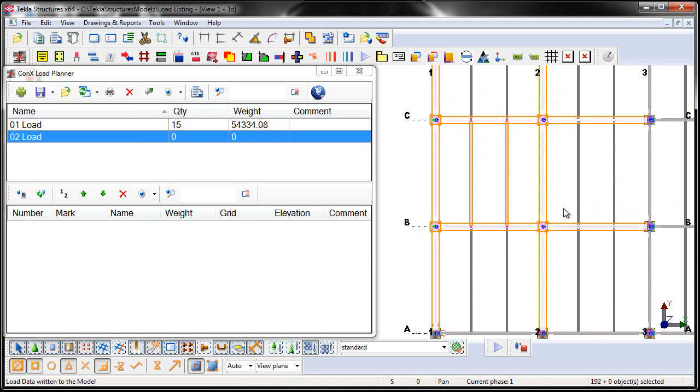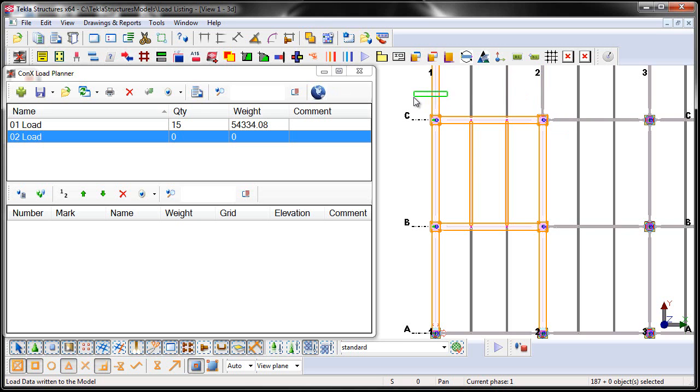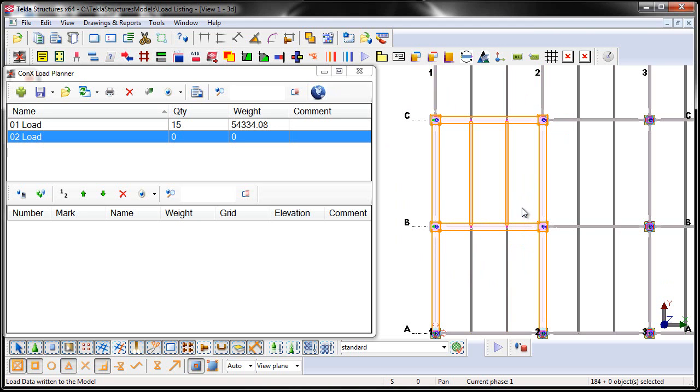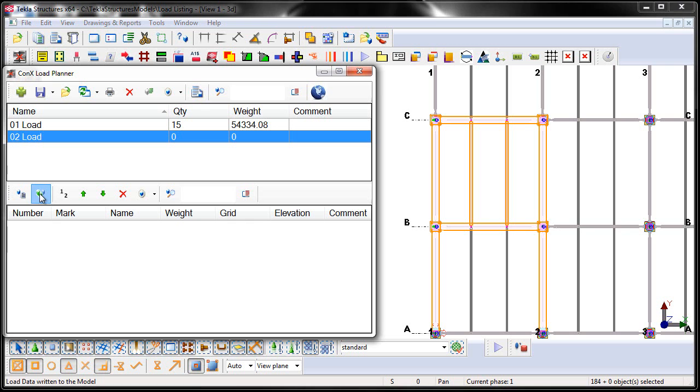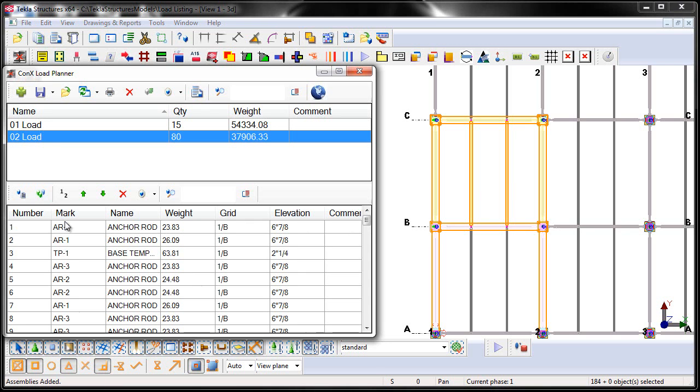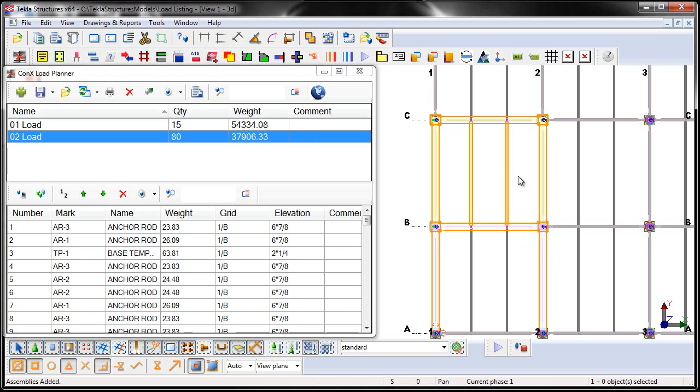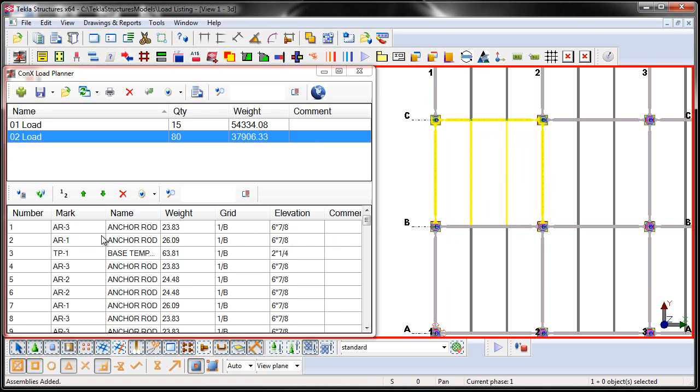And then what I'm going to do is I'm going to window around all of these assemblies here in this particular bay. I'm going to hold down the Ctrl key to deselect assemblies that I don't want to be added into this particular load. If the loads or the selected assemblies were already added into a previous load, they will not be added in this load that you're working on now. So you don't have to worry as much about overlapping load selection. Alright, so let's just go ahead here, and we're going to choose the different option, and this time we're going to say Add to Selected. So here this is going to read all of the particular assemblies that I've selected, and it's going to add them to the list.